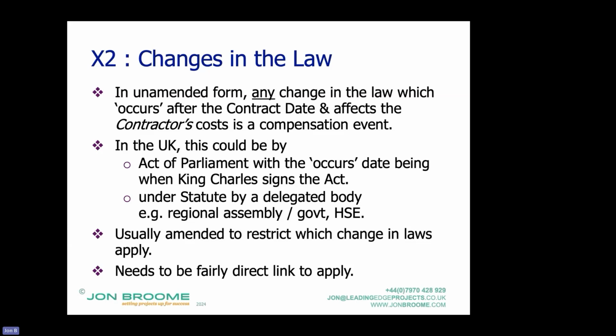The better example of a more recent one is red fuel, which didn't have VAT or other taxes on it, and that was abolished, and the contractors had to pay more tax on it. Therefore a direct change in the law in the UK directly caused more cost on diesel fuel, directly caused more cost on their sites.